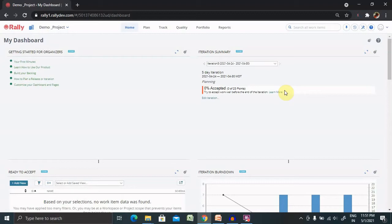We have several technologies interlinked with each other, like the parent-child relationship. In Rally, parent-child relationship refers to a relationship between work items — this relationship implies ownership, where the parent owns its child project or user story. Parents can be divided into infinite levels of children. Predecessor and successor relationships are considered dependencies. Rally uses them to indicate an ordinal relationship in which one user story is dependent upon the completion of another, establishing an order between the two.